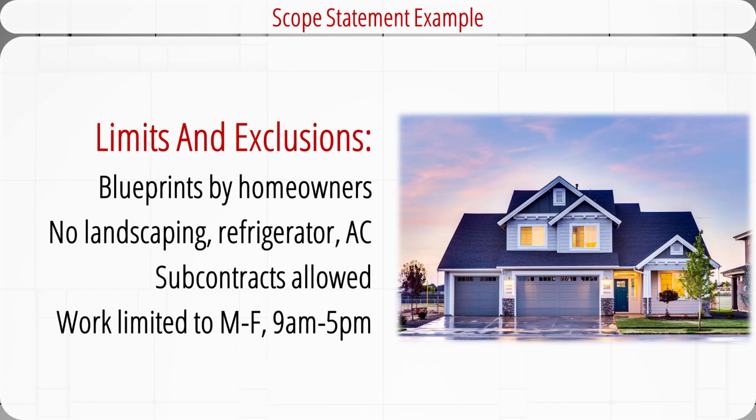Homeowners are responsible for landscaping and not the construction team. Refrigerator is not included among kitchen appliances. Air conditioning is not included, but pre-wiring is included. The contractor reserves the right to contract out some of the services. The contractor is finally responsible for the subcontracted work.